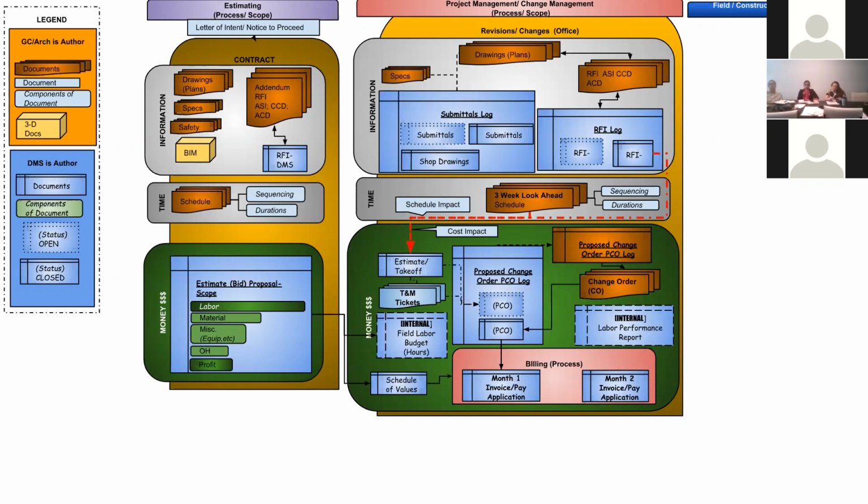So getting it negotiated, getting it clarified, getting it approved, all the way to getting onto the billing sheet, even though we haven't spent any money, is our ideal situation. We want to get ahead of it so it's on all our forms before we start incurring costs. That's ideal. So the urgency is not necessarily to make sure that we're capturing money. We're going to be ahead of it, so that it's negotiated. So when this happens, all the rest of the teams that are downstream, the bookkeeping and accounting, all that's set in place so that we just have to put a percentage in and we'll be able to collect it.